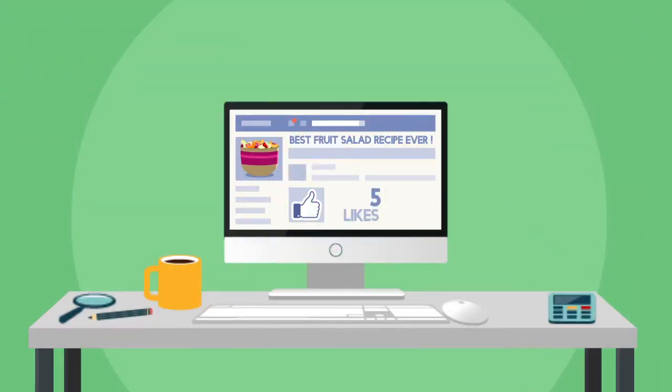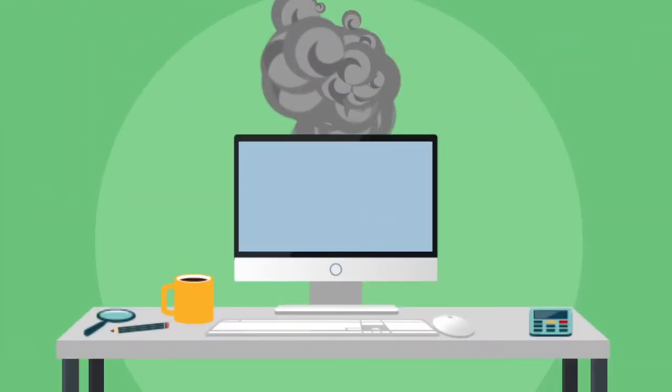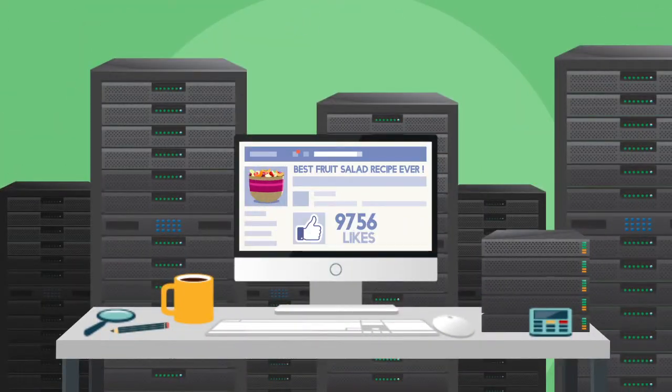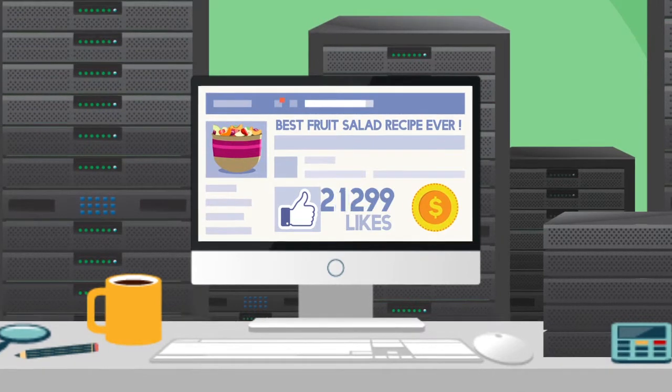Need an example? How about a project where one of the risks is having too many visitors on the project's website? It's a risk if the server can't handle the traffic, but if you plan for this, your risk becomes an opportunity to promote the website to more visitors, which can lead to more business.